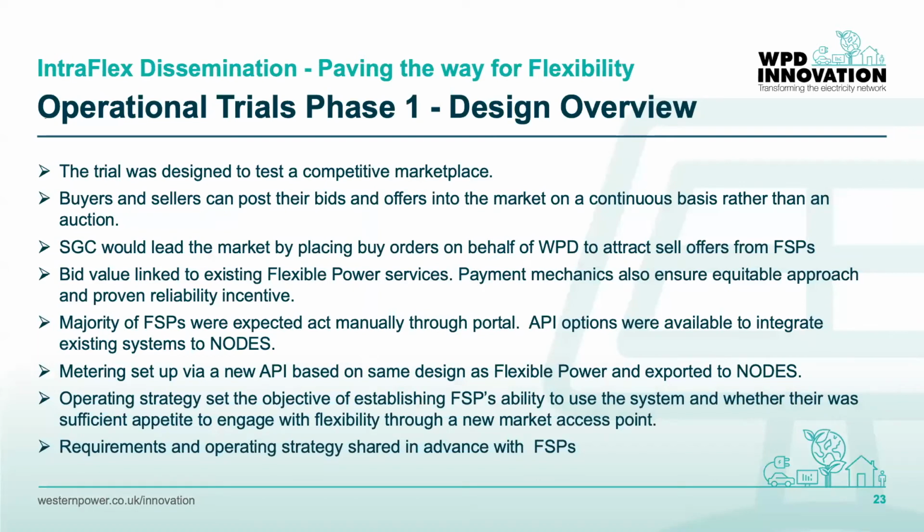Thank you. So the purpose of the trial was aimed at establishing the viability of a very different type of market structure. With previously untested mechanics, it was decided by the project team to phase the objectives and ensure that we proceeded at a pace that our participants would be comfortable with. We therefore decided not only to run the operational aspect of the trial over 2 separate seasons, but there should also be incremental adjustments taking place within each of the seasons.